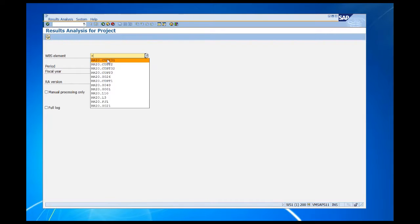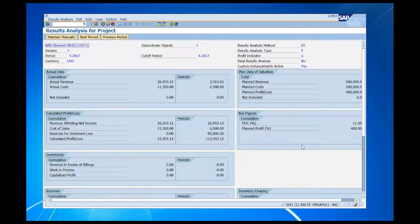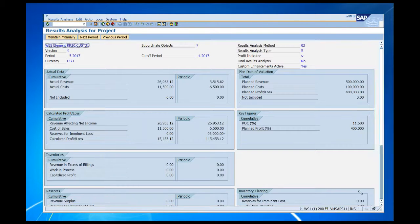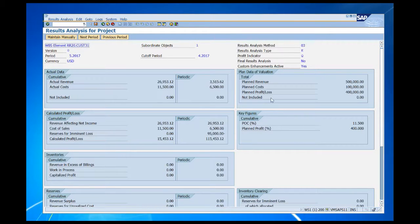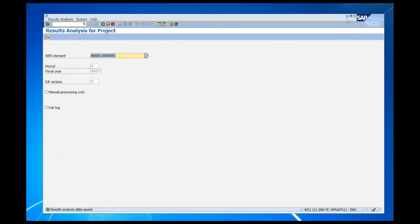Here I am — I'm going to run results analysis on that one WBS. Everything looks good there. Let's go ahead and run that. You'll see now that my plan cost is $100,000, and my actual cost is $11,500. I'm now at 11.5% completion. I'm going to save this results analysis run.